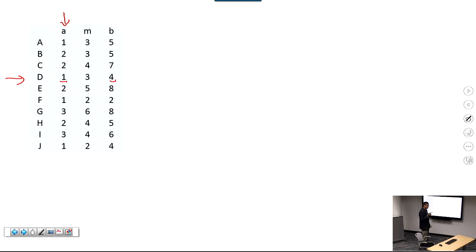And then the M stands for the most likely time estimate. They are saying that most likely, activity D usually takes 3 days. So those are your 3 time estimates: optimistic, most likely, and pessimistic. We find what we call the expected time for every activity.